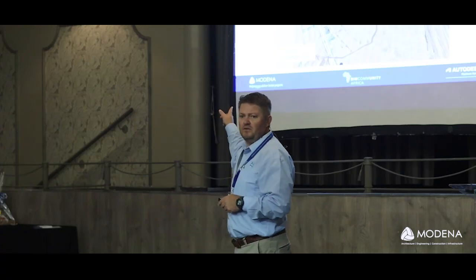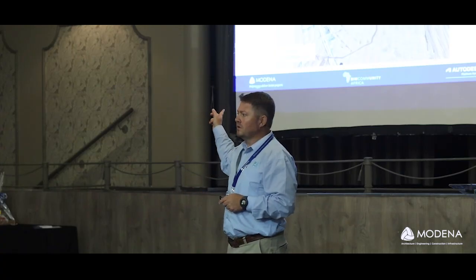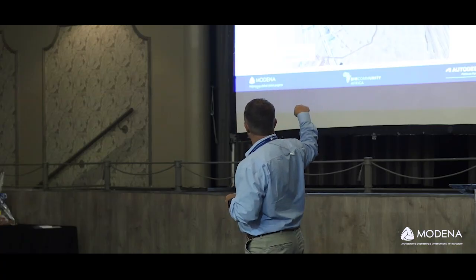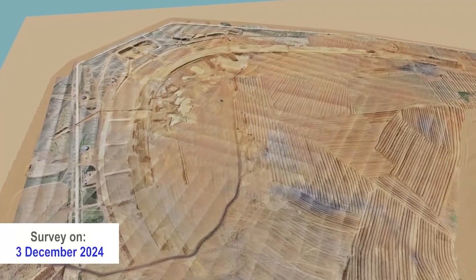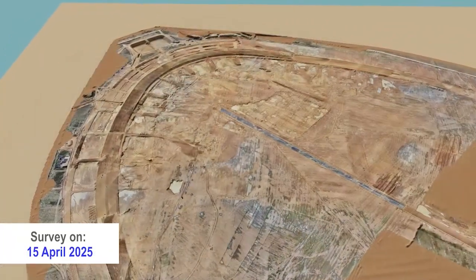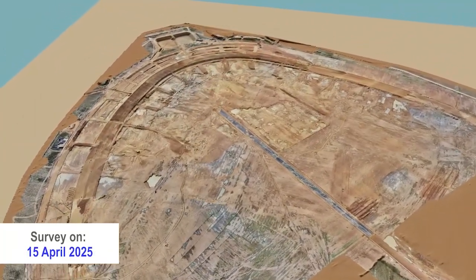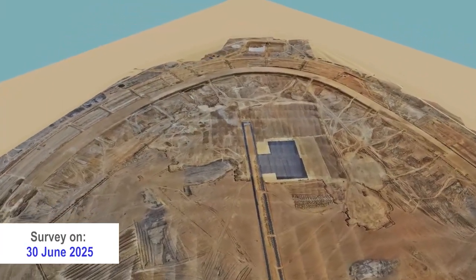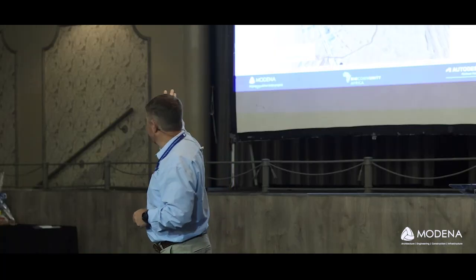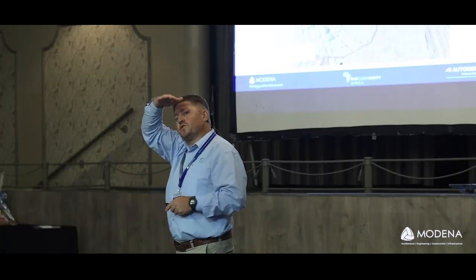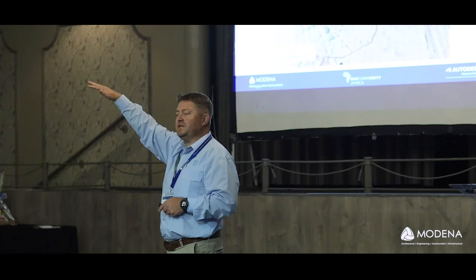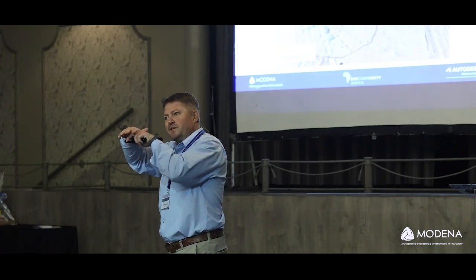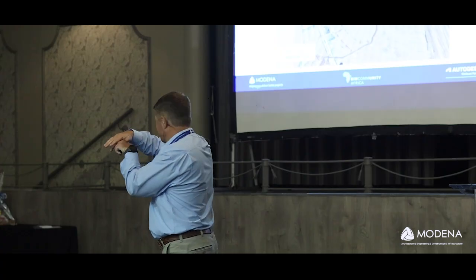This is DRD. You guys know the DRD project? Anybody? It's 14 kilometers in circumference. It's the largest. We modeled the tailings facility in-house, and we flew it with a drone every 2 weeks, and then they overlaid production. And sometimes you can see a berm is a little bit out, so you have to push that one back in.